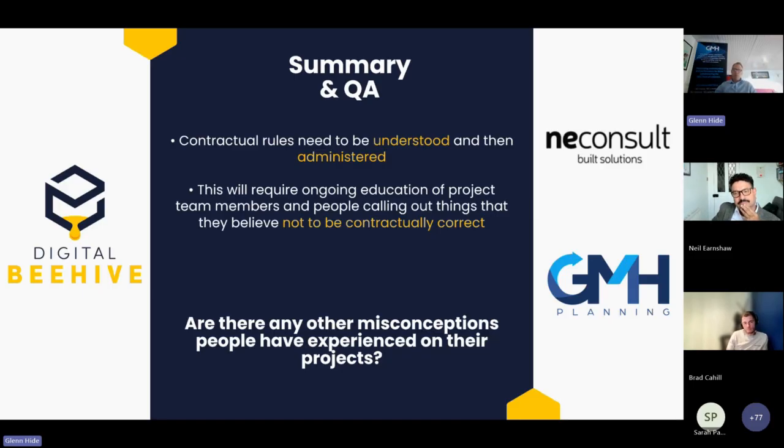And clause 25.3 that Manus brings in is the ramifications if a key date is not achieved by the contractor. In very simple terms, 25.3 says cost incurred by the client as a result of the key date being missed is then recoverable from the contractor. So the big point there is this undefined, unliquidated cost hanging over the contractor's head, rather than the delay damages that we get with key dates and sectionals.